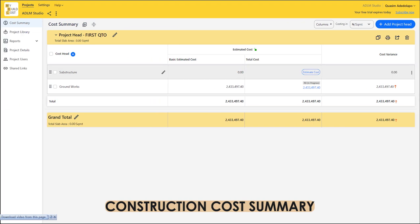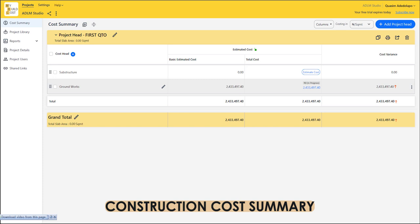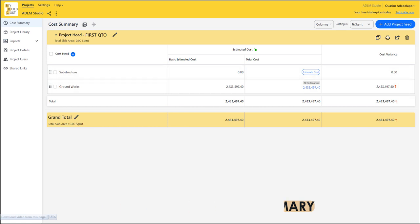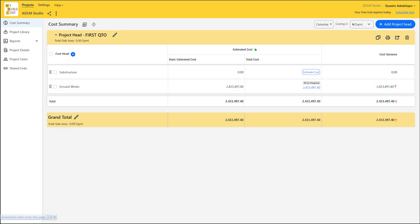This is a completed project done with this software. We can see the cost items, which is the summary of each item of work, then the basic cost estimate and the total cost estimate. This software also measures error, helping you calculate your initial cost and cost of construction while carrying out the project. You can do your cost variance at every stage so you know what you've spent at each stage.